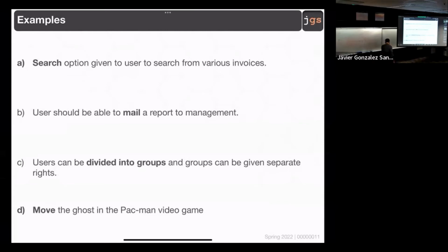This example in particular. The problem with the and is with the independency, right? Here, yes, I have an and. The and is connecting two requirements. And probably the question is, the and is connecting two verbs, two actions, like sending an email and printing something, mailing and printing, two verbs connected with an and. That is a problem. That is not independent. Load information and save information, two verbs. They are not independent, they need to be separate.